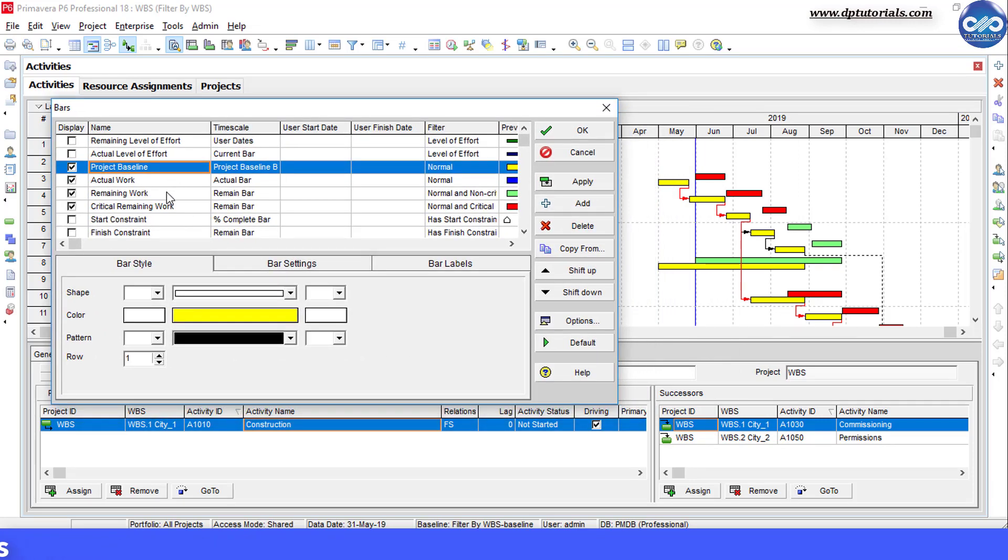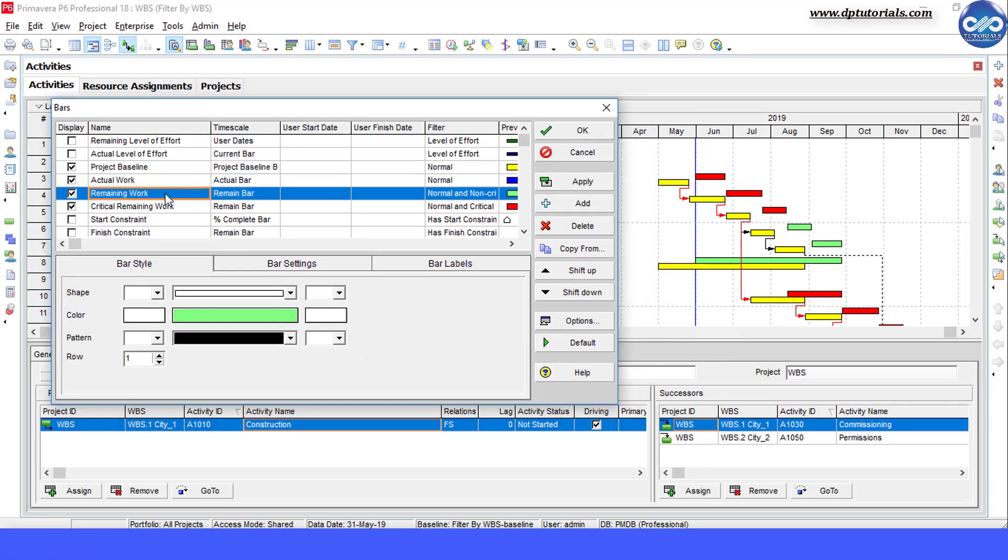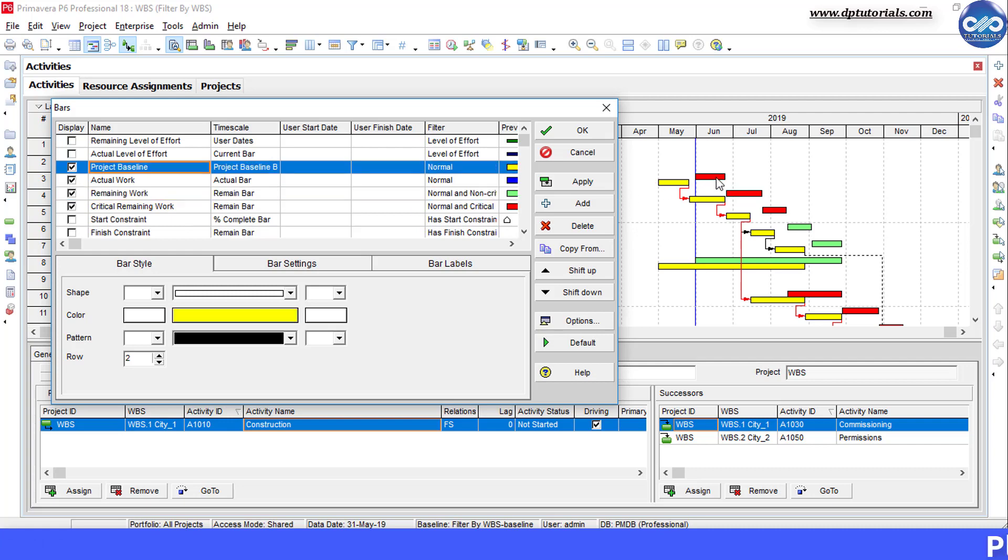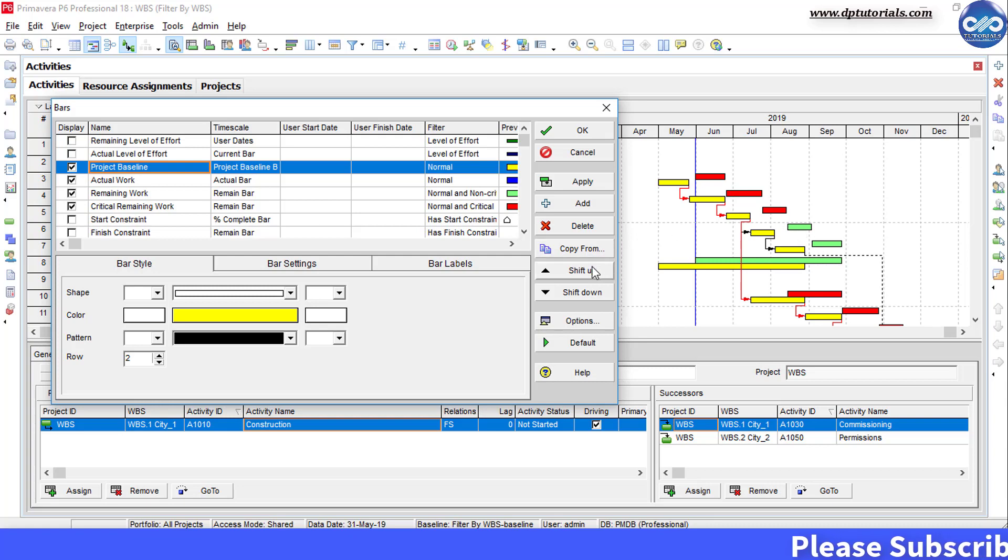So if I want the relationship lines to appear on the actual work bars and remaining work bars, I need to adjust the order in which they are.